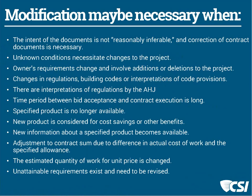There may be products no longer available or changed in how they are manufactured, requiring us to look at different products. There may be an opportunity to save money suggested by the client, us, or the contractor. In North Carolina, a product called EIFS — the Exterior Insulation Finish System — was failing in many applications, so local authorities stopped its use and projects had to find alternatives. There may also be adjustments to contract time and cost.